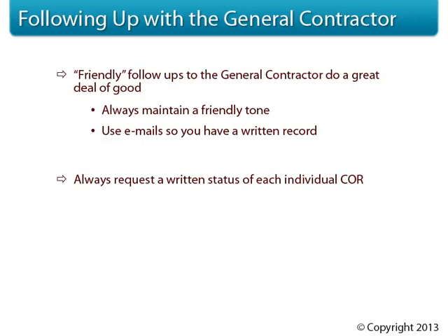Always request a written status of each individual change order request. If you send an email that just says, "Hey, general contractor, how are our CORs coming along?" He'll just respond back and say, "Yeah, they're good." They won't even look up the status of your request. They'll just say good, move on, and never look back. And that does you absolutely no good.